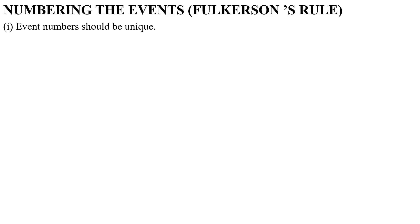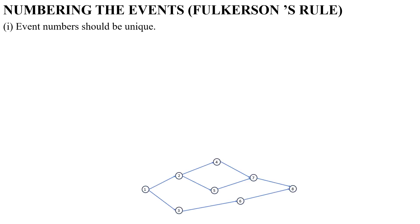First rule is, event numbers should be unique, which means the same number should not be given for different events. In the network diagram below, we have to observe that different events are having different numbers.